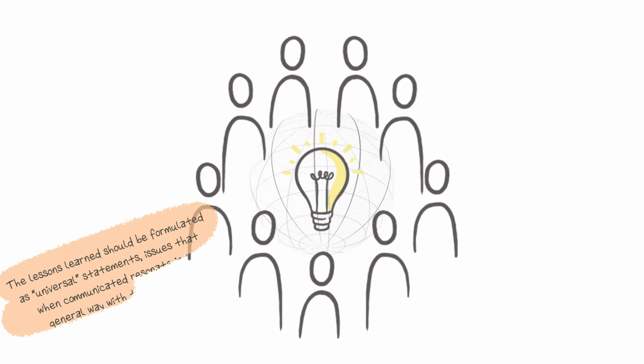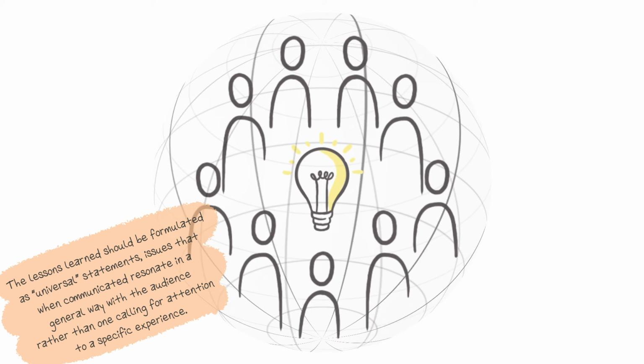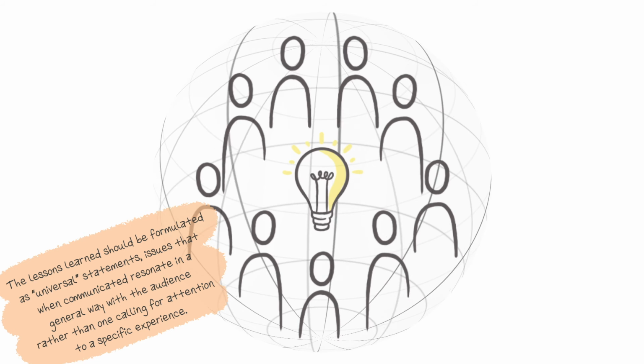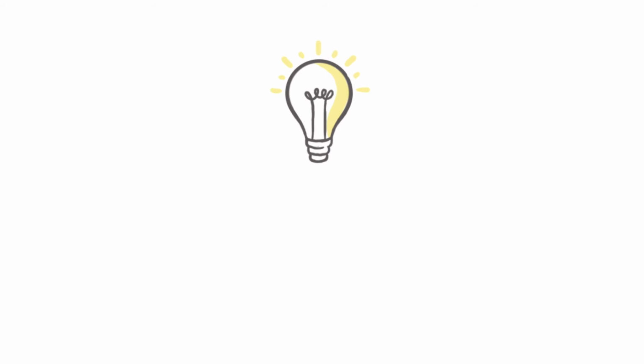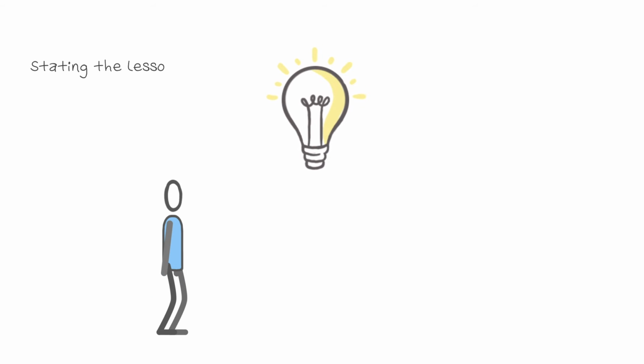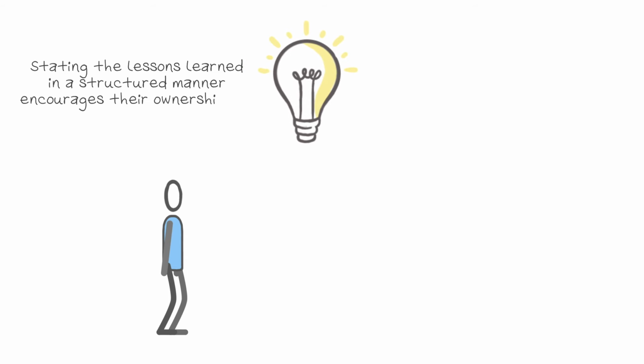2. The lessons learned should be formulated as universal statements, meaning issues that when communicated resonate in a general way with the audience, rather than one calling for attention to a specific experience. 3. Stating the lessons learned in a structured manner encourages their ownership and future application.